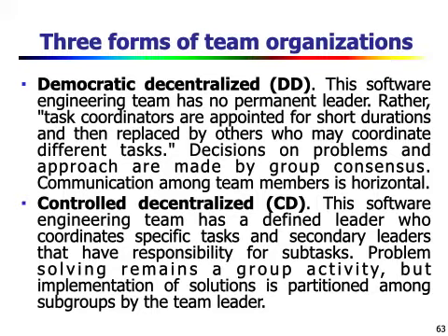Controlled decentralized means this software engineering team has a defined leader who coordinates specific tasks, and secondary leaders that have responsibility for subtasks. The problem solving remains a group activity, but implementation of the solution is partitioned among subgroups by the team leader.